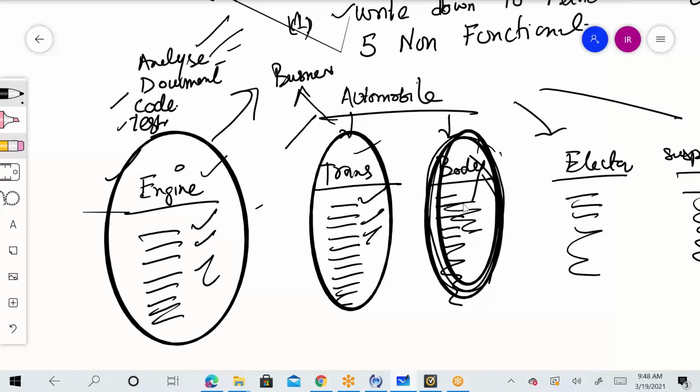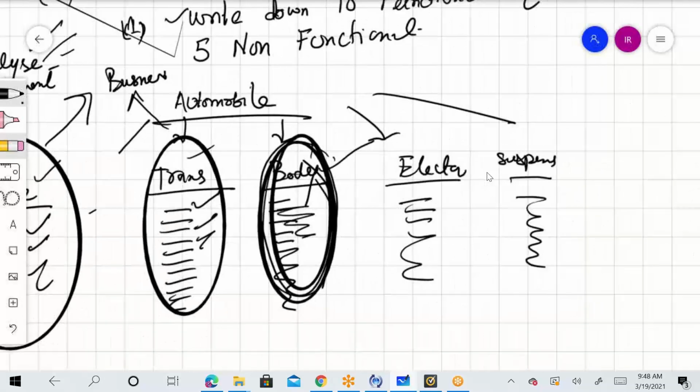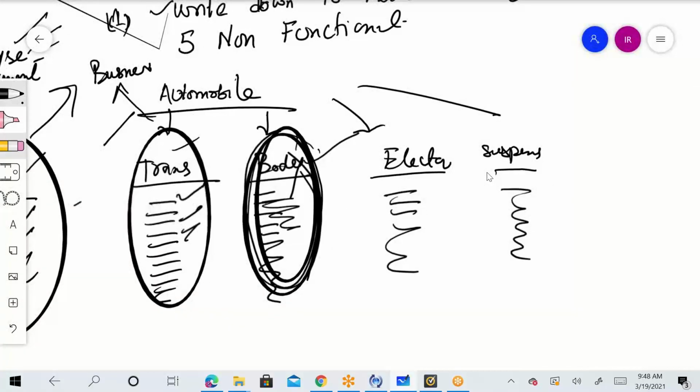not to the whole application. In the case of waterfall, if during testing they want to have something changed, that means you have to go back and document everything, code everything, retest everything. That means using all those steps, going back and doing everything all together. Here you only have to check or change the part which they don't like. So that is called repetition.